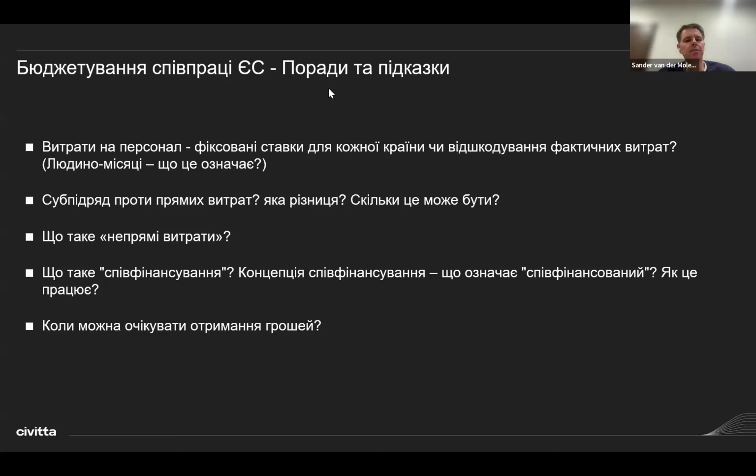Why? Because if you report cost of people and you report other costs, the indirect cost is typically calculated as a percentage of your staff costs and your other direct costs that you will get on top as a reimbursement. Because typically they assume that you have a cost for running your organization. Your employees need a laptop, a phone, office. The office needs to be cleaned. You have certain costs of operating an organization.